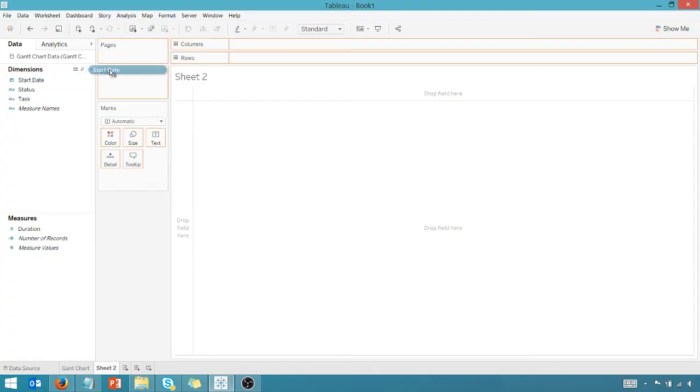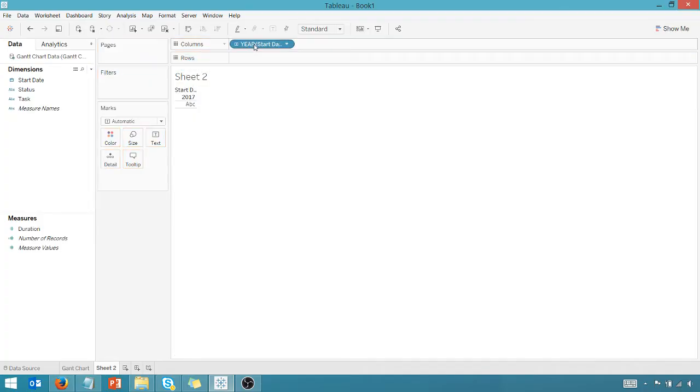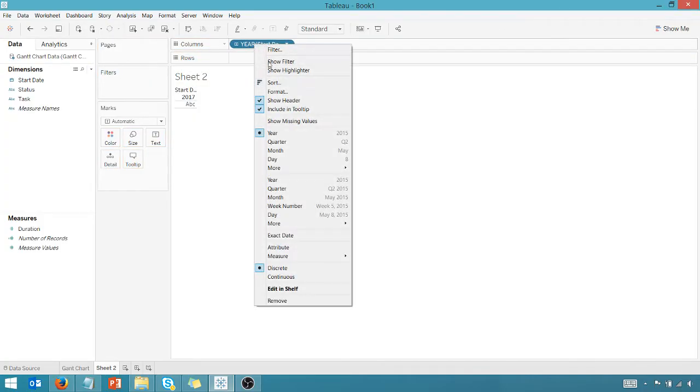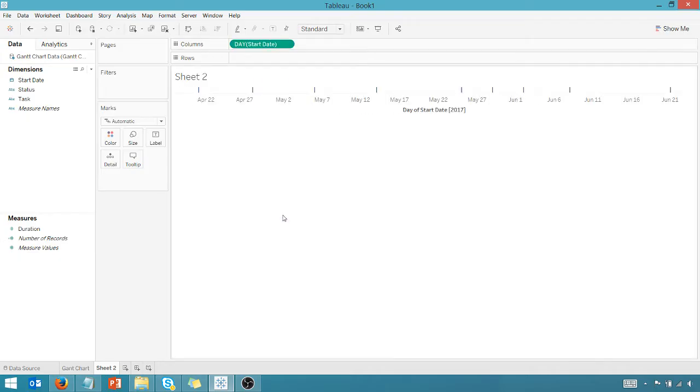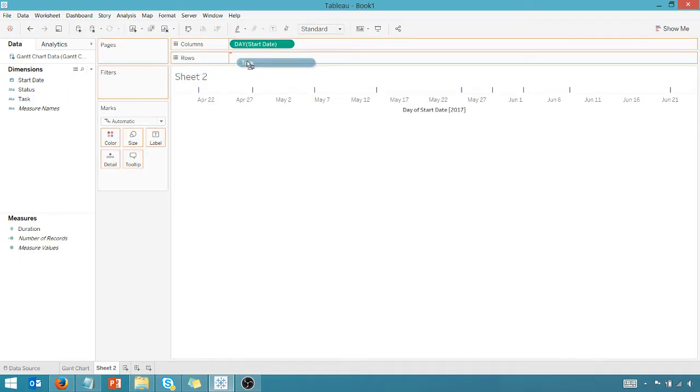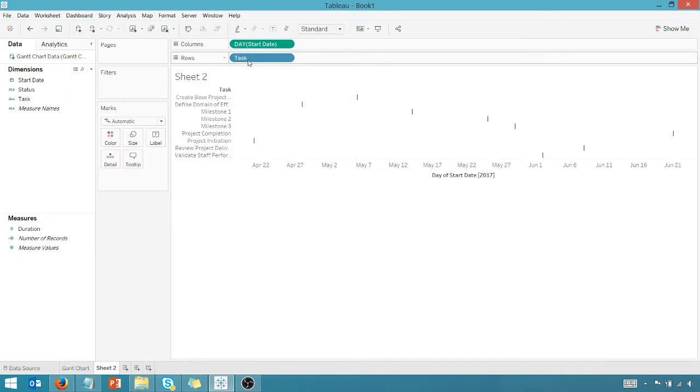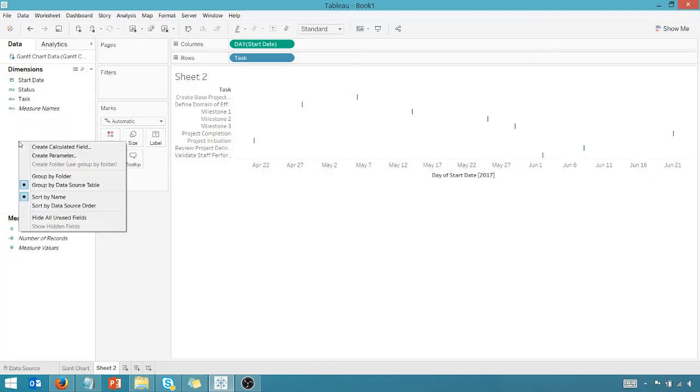So first thing we're going to do, we're going to take the start date and drag that to columns. We're going to make sure that is a day. Then we're going to drag the task to rows. And I want to create a calculated field at this point.